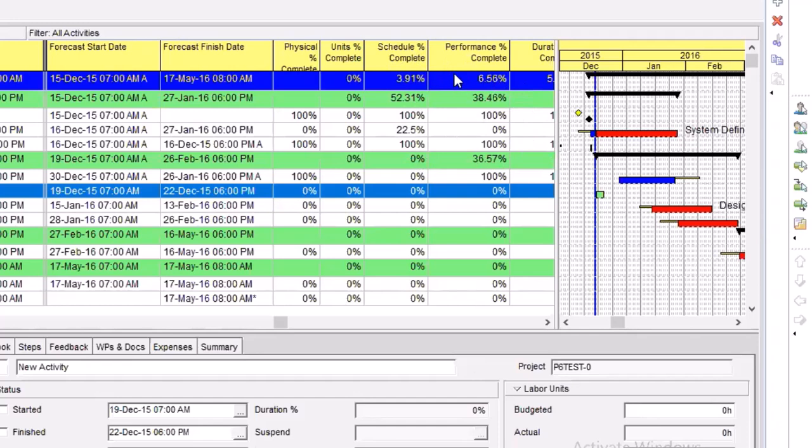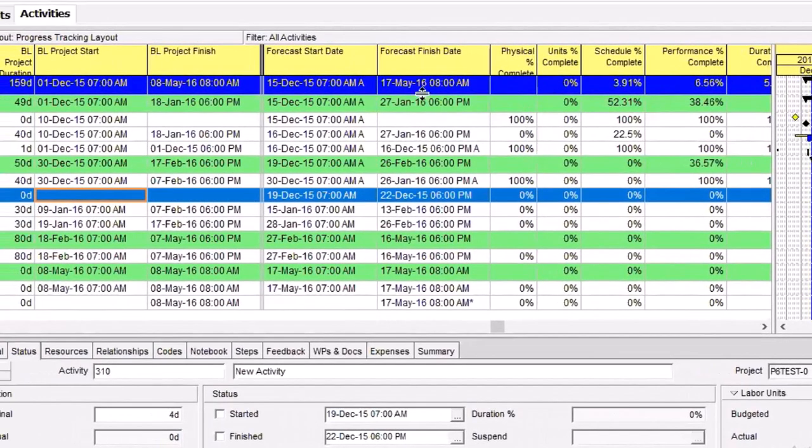This one, you can send this to clients and use it to deceive the people that don't know. But as for you, come here and see that you're going to run into problem. Remember, it's even showing already on your dates that 8 versus 17. So it's already showing you on your date, irrespective of whatever unit. So you might be good on cost. That is what this one is saying. I am good on cost, right?